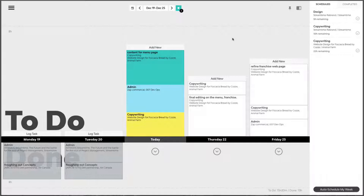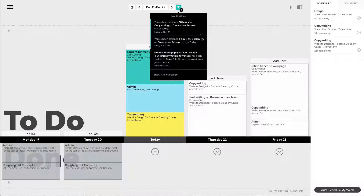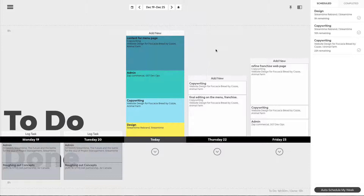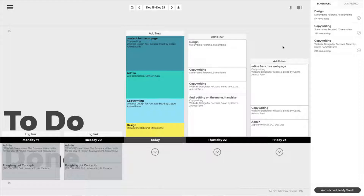As the user, they'll get a notification and it will start to appear in their scheduled area on their to-dos. The to-do area is where your users will live day-to-day, and this is also where they'll be able to track their time. This is my to-do list — all the work I've been given so far, and I've planned out my week accordingly. The notification will tell me I've been given 10 hours for copywriting and 5 hours for some design, which I can easily add an hour for the day. Or I can come over here and assign hours out for the days I need. Today's looking pretty busy, so I'll put some copywriting on for tomorrow and stretch some design to 2 hours.